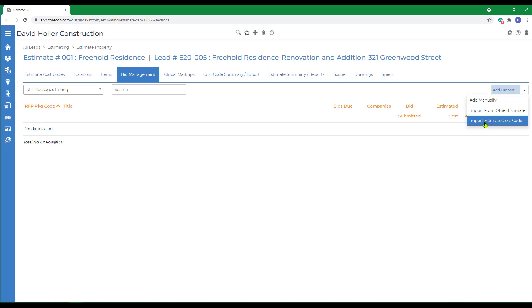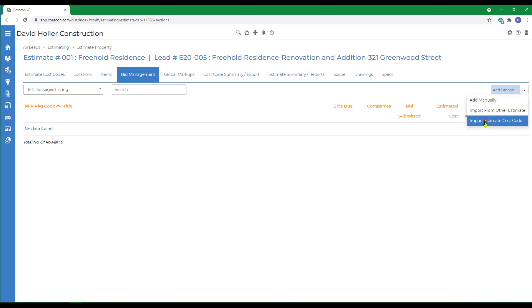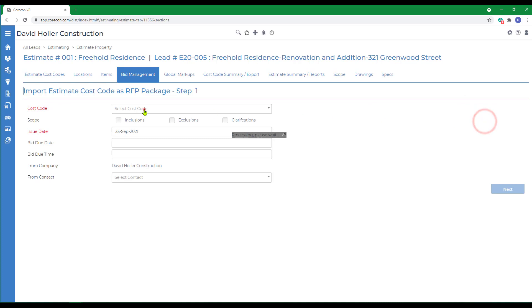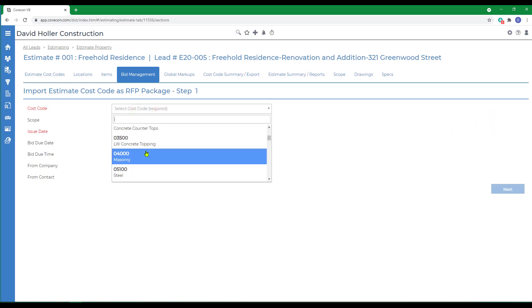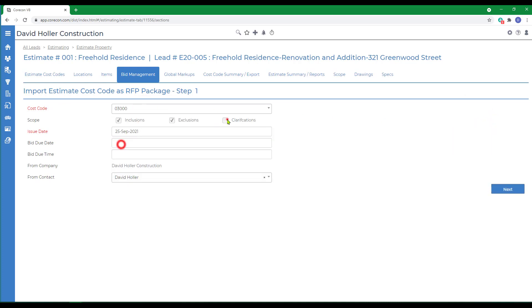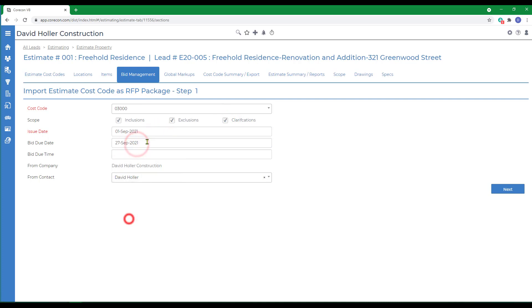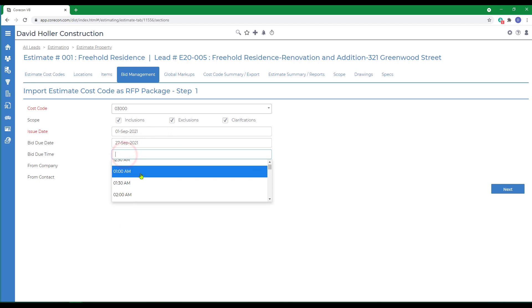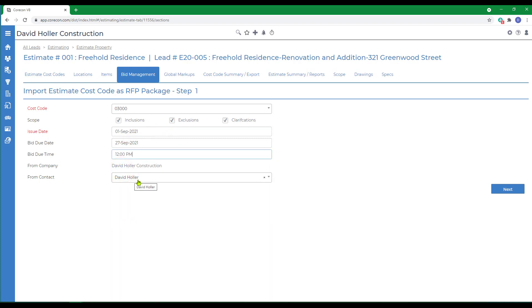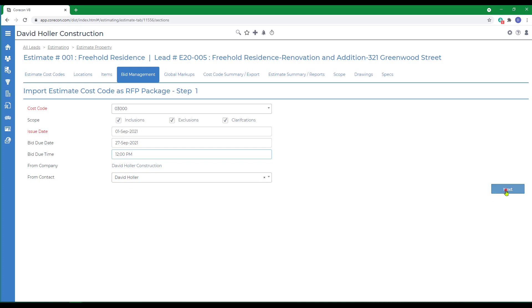We'll use the import from estimate cost codes. We're going to select that cost code. We'll import all of the scope since it's there. We'll set the issue date, the bid due date, the bid due time, and tag a contact within your company as a coordinator, and we'll click Next.